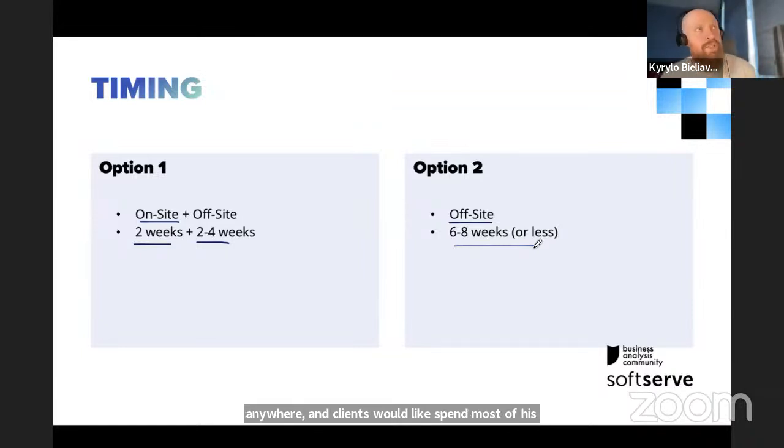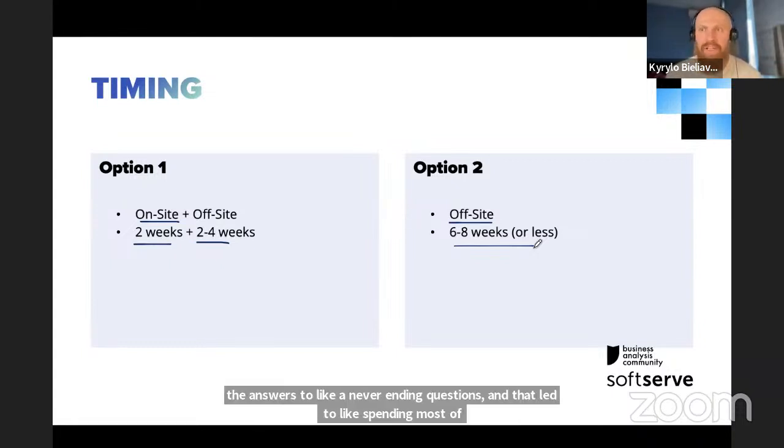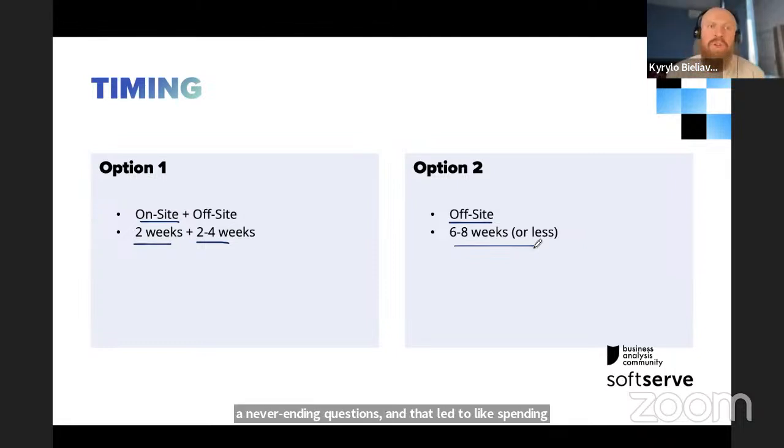I had a story told by one of my colleagues that they once had a discovery phase which lasted almost half a year. And that was a really, really long and exhausting phase, I would say. So they hardly developed anything, because they were continuously discovering and trying to find the answers to never-ending questions, and that led to spending most of the client's budget without delivering any value. And that's really a bad example. So you shouldn't do that.